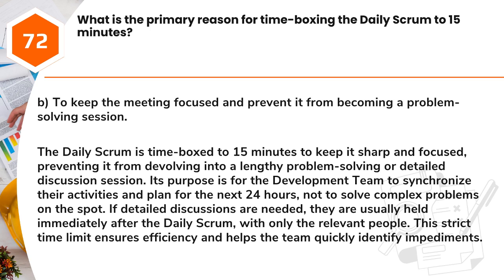Answer: B. To keep the meeting focused and prevent it from becoming a problem-solving session. The daily Scrum is timeboxed to 15 minutes to keep it sharp and focused, preventing it from devolving into a lengthy problem-solving or detailed discussion session.